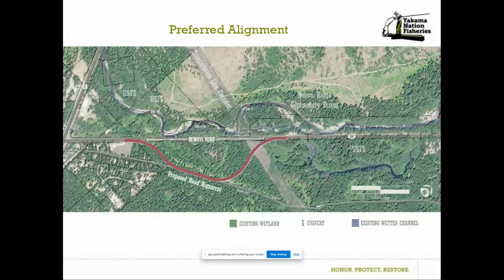It moves the road away from Nason Creek from River Mile 3.9 through 4.5, which eliminates the two most active CED sites. It removes the road from inhibiting river access to the historic floodplain and channel migration zone, and improves aquatic habitat complexity. It avoids avalanche hazard areas, avoids private property, and this alignment is constructible if awarded the large cap grant. And it sets the stage for future options of removing additional road out of the floodplain.